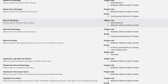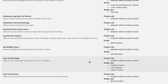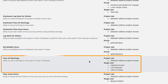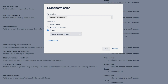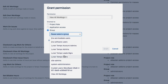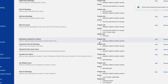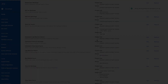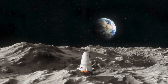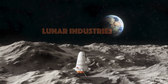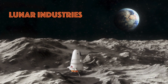There's one more permission that I need to give to only managers and administrators at Lunar Industries, and that's the View All Work Logs permission. This permission lets these people see all the work logs that are created for this Jira project, and that's important for being able to run reports on time spent on projects later on. Now Lunar Industries is ready to test out Tempo Timesheets, and the workers can start logging their time spent on research or mining resources on the Moon.